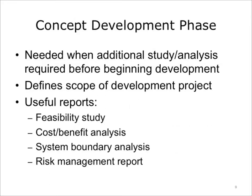The concept development phase begins when the concept proposal has been formally approved but additional study and analysis are required prior to system development activities. All relevant factors are analyzed to develop the project scope. Several reports can be created here: a feasibility study — will it work?; a cost-benefit analysis — is the cost really worth it?; a system boundary — how far should the project go?; and risk management — what will happen if we don't do it? These reports are then presented to decision-makers, who approve the funding, and if approved, the project moves to the next phase.